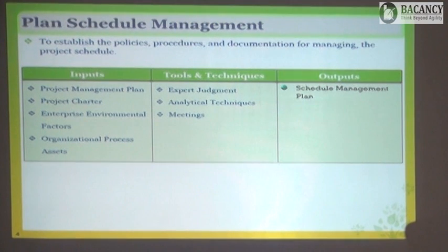So if we have estimated that this particular piece of work is going to take 10 days, we will say the permissible limit of variance for all the activities is plus minus 0.5 days or plus minus 1 day or plus minus 6 hours. We will give that much space assuming that the assumptions can go wrong. And who are the people who are going to create the schedule? Who are the people who are going to maintain that schedule?